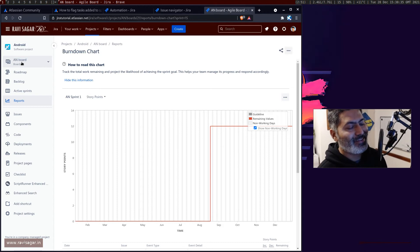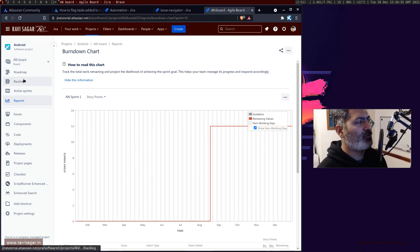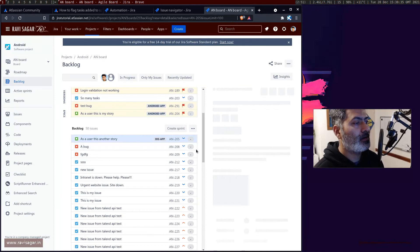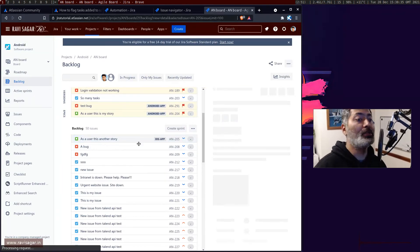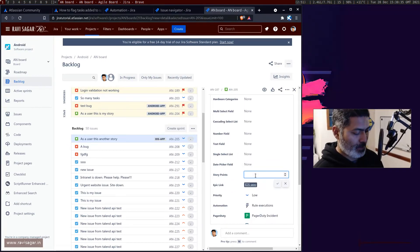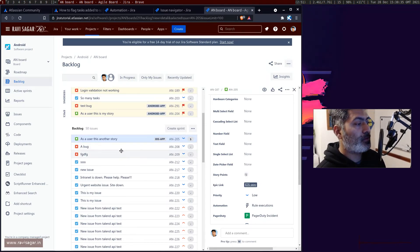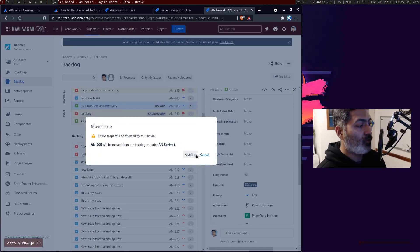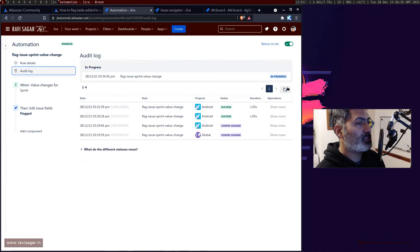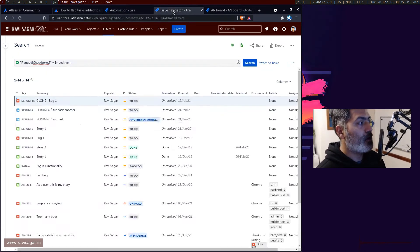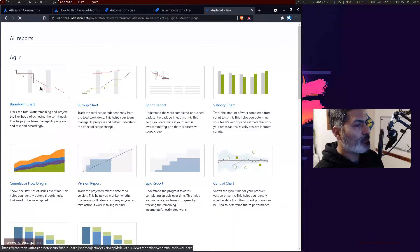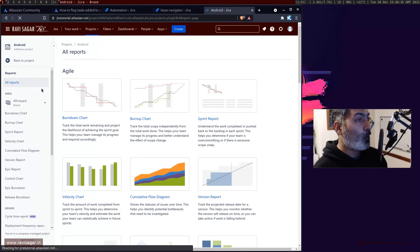The chart will also show you alongside the guideline — the original baseline, whatever you want to call it. Going back to the backlog, I think we don't really have any story points here, so let me add a story point for this particular issue and add it to the sprint. For adding a story point, I can do it from here — maybe five. Once you do this addition, the rule will work. Let me go to the audit log and refresh. It is happening — I can see it, good. It did work. Going back to the report, you should be able to see this change of scope in the burndown chart.